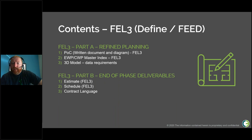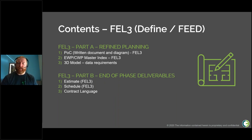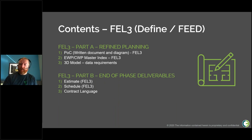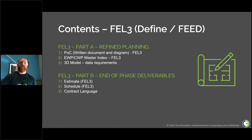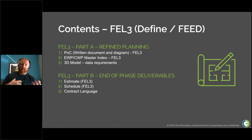During FEL3 the master work package index is updated and 3D model data requirements are considered. A bad model with limited or incorrect data causes significant rework downstream, so it's critical to specify data requirements to the engineering contractor upfront rather than discovering mid-way through detailed design that the model doesn't meet AWP needs. The toolkit will provide data requirements for what's needed to support the model during FEL3.